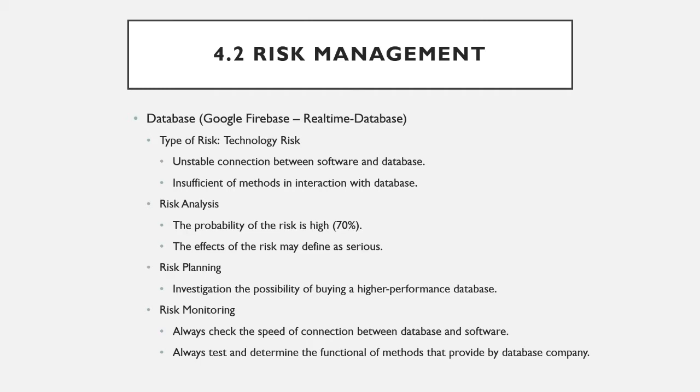4.2 Risk Management. Database. Type of risk management is technology risk, unstable connection between software and database, insufficient of methods in interaction with database. Risk analysis. The probability of the risk is high. The effect of the risk may define as serious. Risk planning.